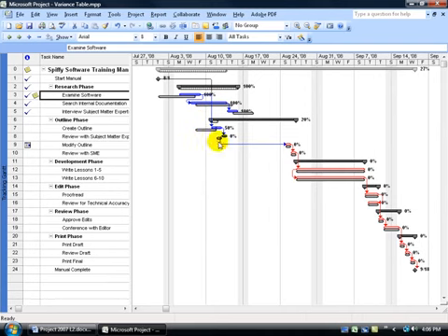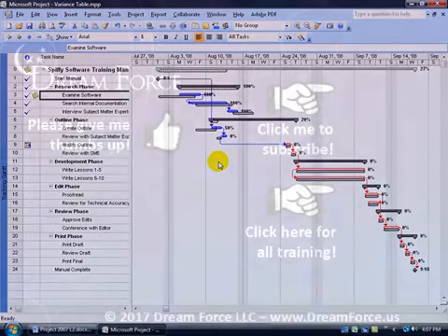They've all slipped. But everything else, if we're on track, as you can see down below here in the critical path, if we don't enter any actual start times or finish times other than the defaults, then we should have none of these tasks slipped off of their baseline bars here and finish on time, September the 18th. So again, you have the variance table if you want to track and compare your actual start and finish times to the baseline, or you can come in here and visually view it in the Tracking Gantt.